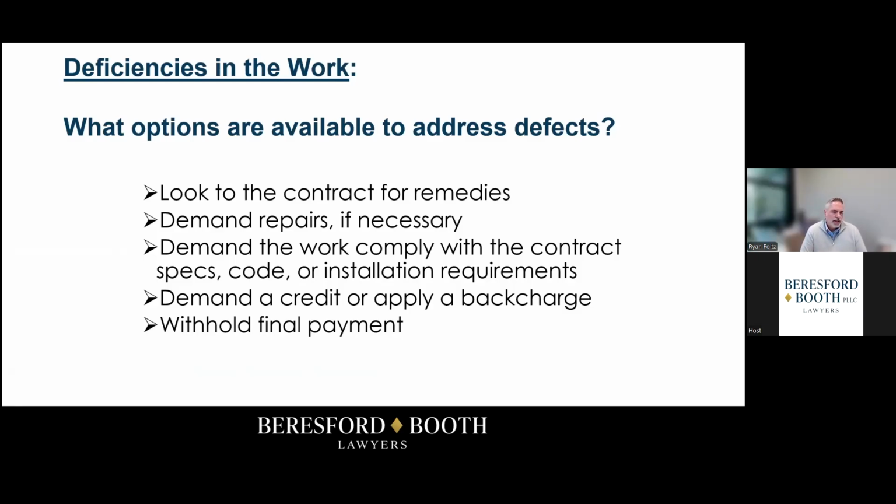There's also some financial options that you can employ. You can demand a credit, in terms of money back to you, for the work that was not done appropriately. Or if you have to hire somebody to complete repairs of the defective work, you can assess what's called a back charge against the contractor for the value of the work or for the value of the repairs that you had to pay to complete the work in an appropriate manner.